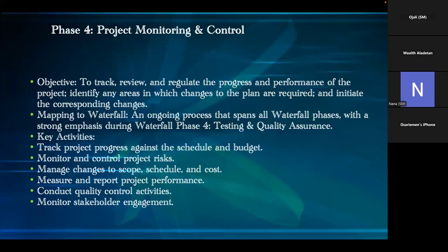So once you look at a Kanban board, you can tell that story A is with the testers. And if it's taking too long, you can just call the tester or send him a mail: Mr. John, this story has been with you for 2 days. What's happening? And then he will explain. So that's Kanban. It's just a visual board that tells how the story goes from one point to the other.